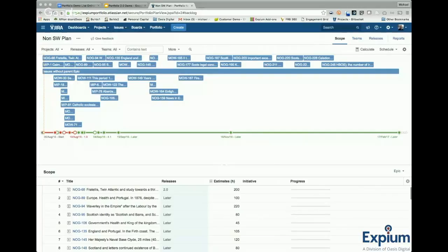Yes. What I love about the idea that you're bringing up there is I can actually set up 3 different strategies. As long as I don't commit those changes back to JIRA, I'm not making a bunch of changes. I can create 3 plans, and one of them involves just the staff we have today.